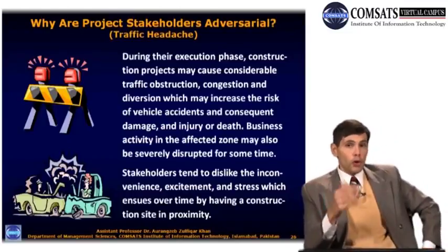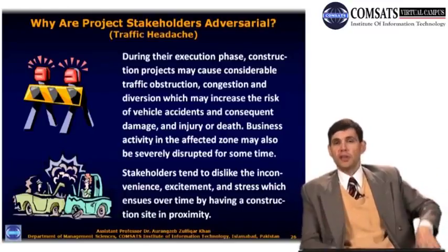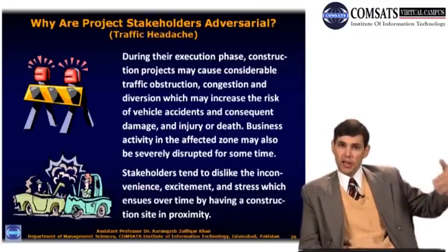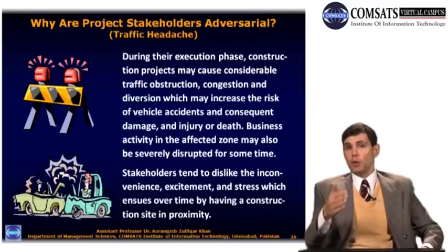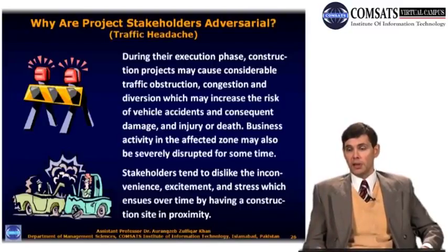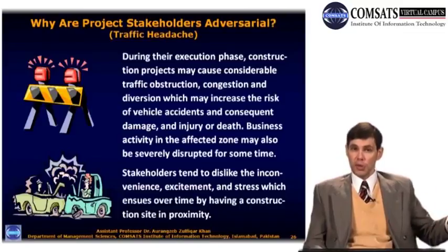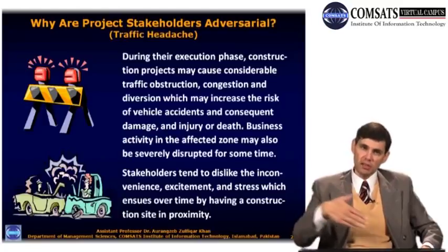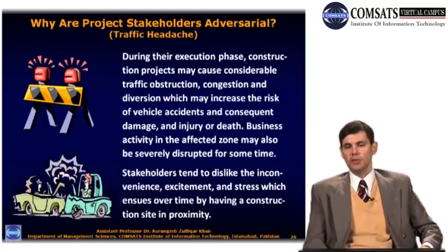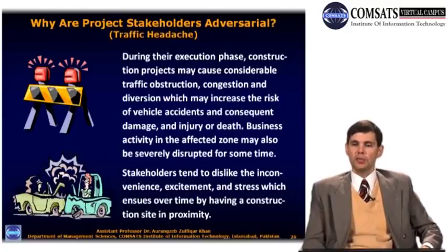If you're building a new bridge or a flyover, and the whole area has to be closed, the people who are driving have to take side roads. You can imagine the side roads have limited capacity, and they will be clogged. The people who are living there will be affected negatively. Commuters will take longer to commute. Longer time means, of course, higher cost, and possibly less time for work. And the businesses there will suffer, because people who want to come and shop there cannot come so easily. They have to make maybe a long detour. So it's not as easy as if you were to just go there directly. So a lot of people might be deterred from coming to do business.